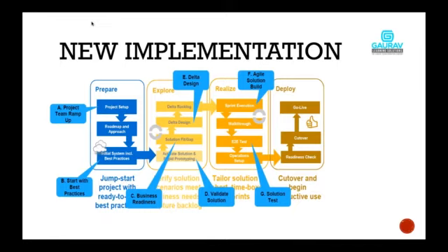So what is agreed? The customer is saying yes, perfect. If SAP is able to provide me these functionalities, I want to go with the standard one. But somewhere, if the customer is saying no, this is something which I follow differently in my current system, and I want to adjust SAP accordingly and make a custom object out of that, then you will identify it as a gap. So you'll be having fit and gap analysis here.